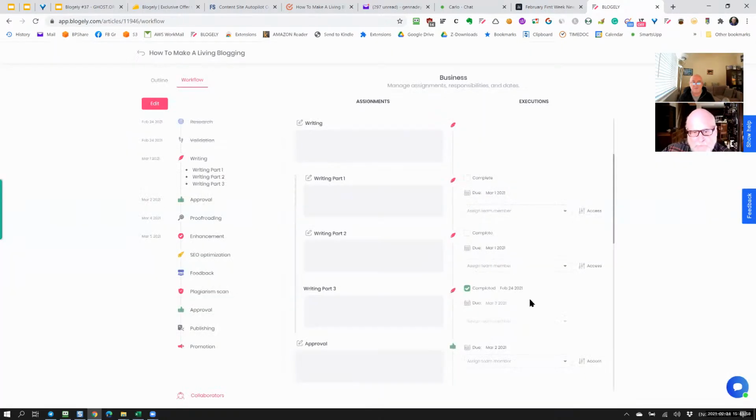Now, I just want to mention about sequential, and we have two flows. This flow is sequential, and this flow is simultaneous. The simultaneous means you can do these three tasks at the same time. They will not interfere with each other. So in a team, you will have three different people working on three different tasks, each one covering their own parts.